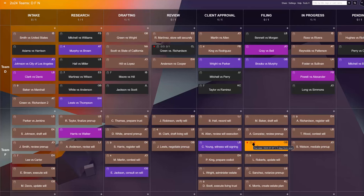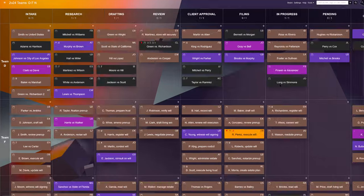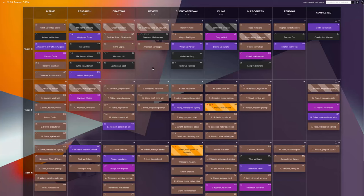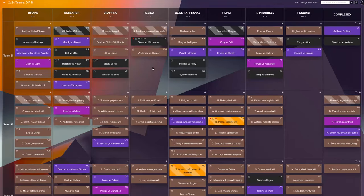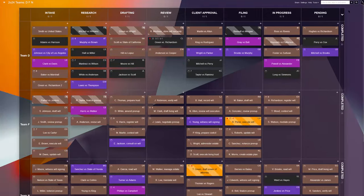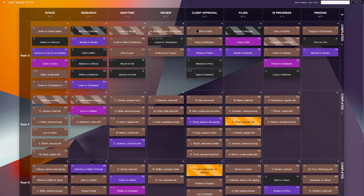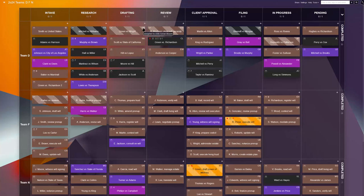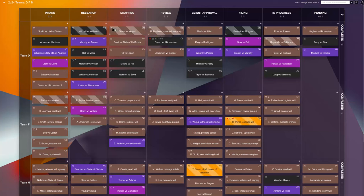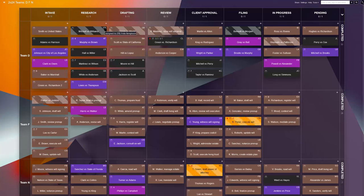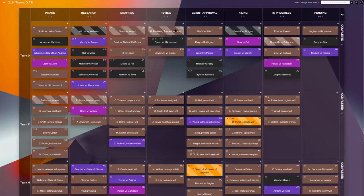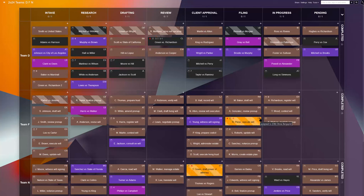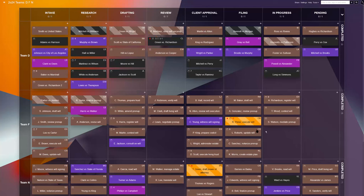The currently set work in progress limit is one task per team member at all stages. It helps prevent overload and highlight it should it occur, and ensures that tasks are completed efficiently with the employee's 100% focus on the work in front of them. Doing that not only takes a load off the lawyers' minds, but also improves the accuracy of how they perform and limits errors.